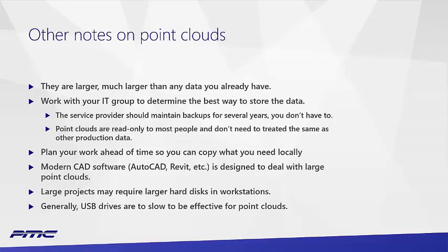So a few more points to consider with point clouds. Point clouds are very, very large data sets. I'm sure anyone on the call today that's worked with them knows this. But if it's your first time or the first time you're going to try to put them on a server to be backed up and things, you should coordinate that with your IT department. There's a good chance that a single scanning project is bigger than the typical amount of data that your company generates in a year. They will not be expecting that, and they should plan for that.